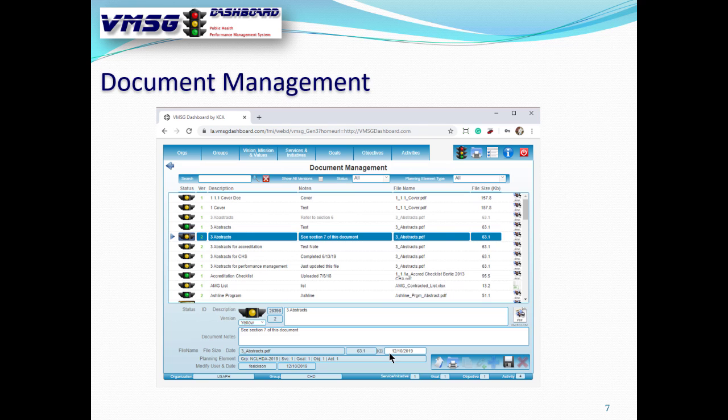So you've got a bunch of department policies that typically are updated every fiscal year, every couple of years, something along that line. So why not just build a quick little plan that has an objective that says manage all department policies on a fiscal year basis. And then underneath the objective, you have activities for each plan. Attached to that activity is the plan document. When it comes time to update that particular policy, the person who's been assigned as the activity lead is going to get an email notification. They're going to download the existing policy, they're going to do the updates, they're going to upload the new version, and they're all done. So it just makes a nice tool.